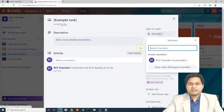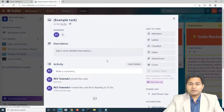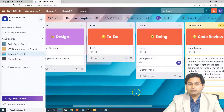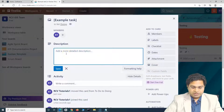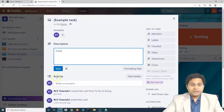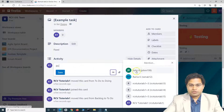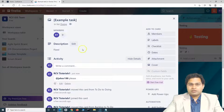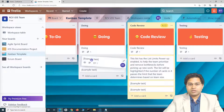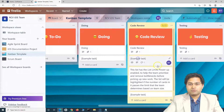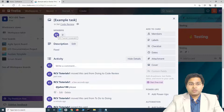A task with no design or research required can be moved directly to 'To Do' and assigned to a team member. That team member picks it up and moves it to 'Doing' while working on it. Once they've found and fixed the solution, they provide a description and add a comment mentioning a reviewer — for example, 'please review' — so that person gets notified. The developer then moves the card to 'Code Review' and assigns it to the reviewer.